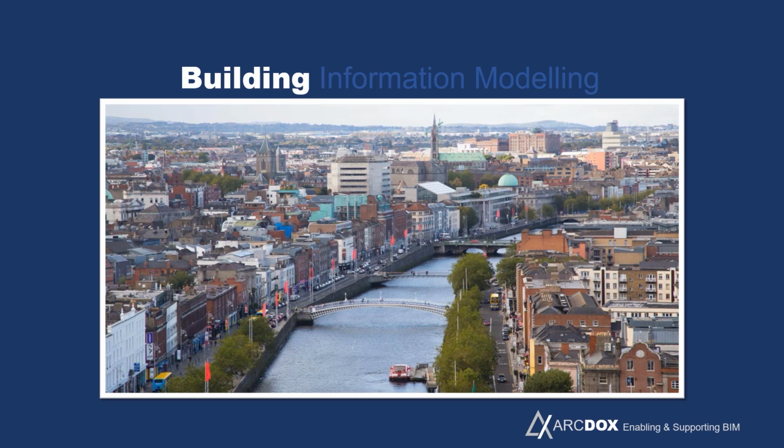Now, behind what you see in this picture of physical infrastructure, there is information that describes how this built environment is to be constructed, and information that describes how this built environment needs to be maintained and operated. And in fact, under health and safety legislation, every building you see in that picture is required to have a building record, a record of information of how it was constructed and information that describes how it should be safely maintained and operated through its life cycle. So information is really key to how the built environment functions.